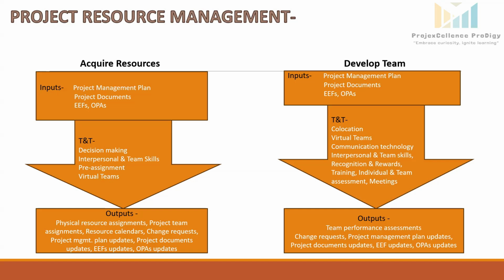The resource management plan will specify the resource needs, roles, responsibilities and procurement strategies. The procurement management plan will guide how external resources will be acquired, and the cost baseline will provide the overall budget for the project activities. According to these, we can acquire our project resources.